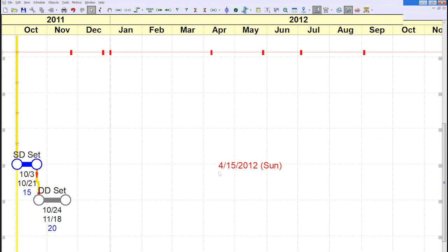Okay. So again, over there, let's say it was a schedule that at some point was in NetPoint. It then went into P6, so you updated your P6 schedule at that point. And then after that, you went in and added more activities in P6. Those activities will stay in P6. They will not automatically appear in NetPoint. You'll have to do an export out from P6 again, and then import the schedule into NetPoint.